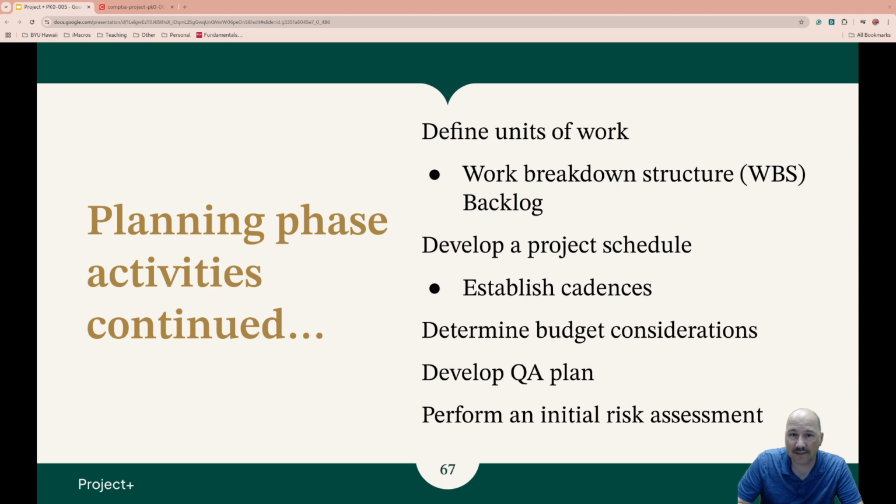Identify the potential risks early on as much as possible. And make strategies to overcome them. Now, risks can't always be identified. For the ones that can, you should list, are they a financial risk? Are they technical? Are they operational? Where does the risk fall?